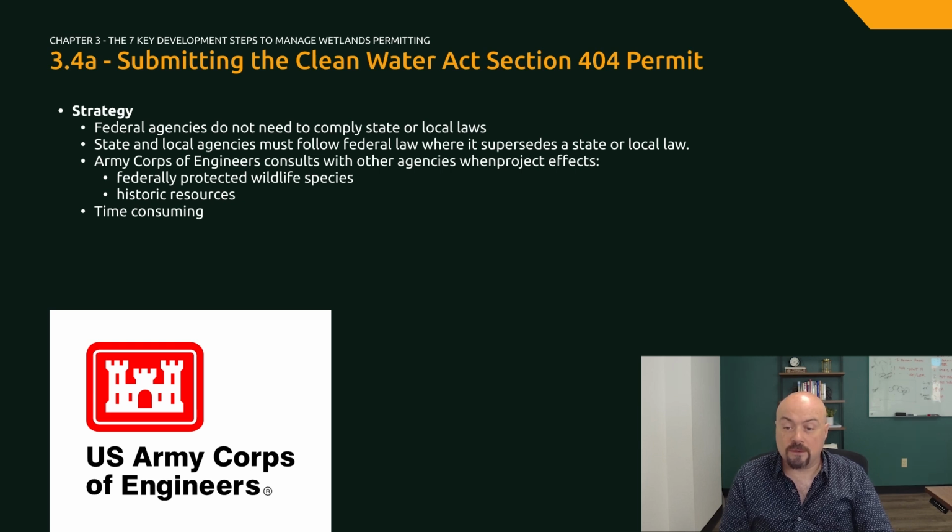Another factor to think about with the Army Corps is that the agency must consult with the U.S. Fish and Wildlife Service if there is a potential that your project might affect a federally listed species under the Endangered Species Act. This process can take 180 days or more if there are incomplete notices, so it is important to plan ahead and submit a thoroughly detailed biological assessment. The Army Corps also must consult with the State Office of Historic Preservation if there is a potential that your project might affect a culturally or historically significant resource, which can take up to 120 days.